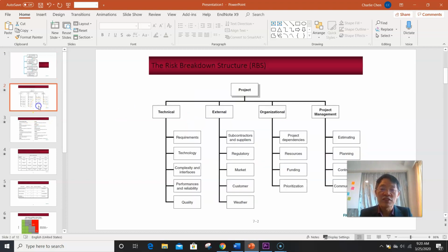First, for risk identification, your team needs to come up with what is called a risk breakdown structure that begins with your project name and then different categories. In each category, you want to have a specific risk. For instance, nowadays when you are doing a concert, you have to think about the weather, so you might call it external. I will let your team decide. Also think about coronavirus, the pandemics. Maybe that's another risk, and you can call it a pandemic or external risk.